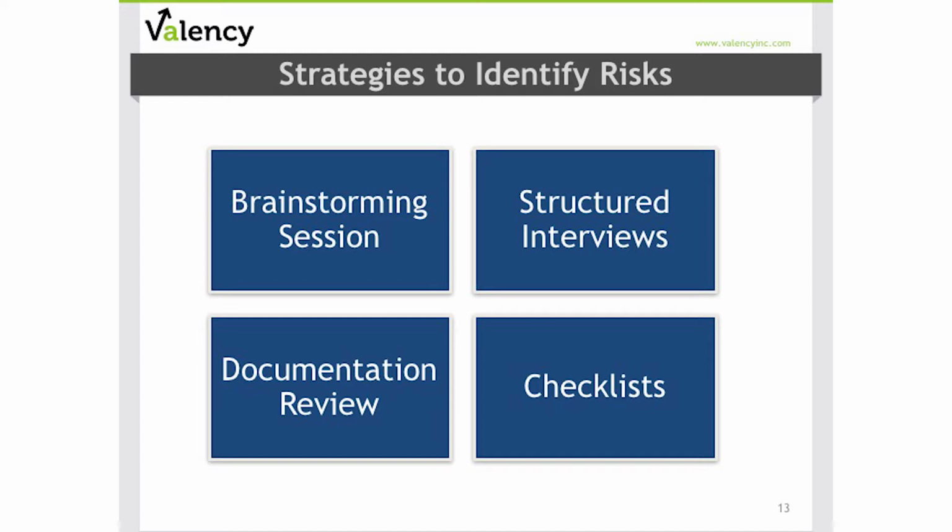We'll start with, there are many strategies that can be used to initiate risk identification, but the most effective ones that we have seen in capital projects from CII research, first of all, the traditional brainstorming process. This is the most common strategy that's used with project stakeholders and subject matter experts and experts that you may bring in from externally. And a brainstorming session is going to be most effective if it's led by an external facilitator from that project team.